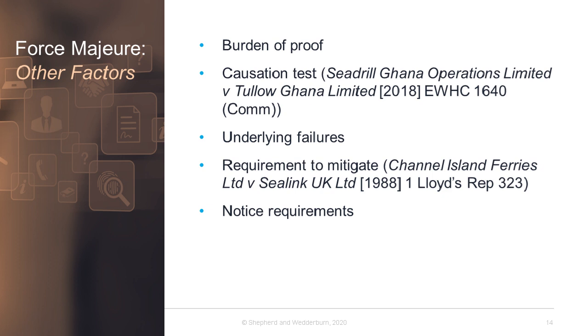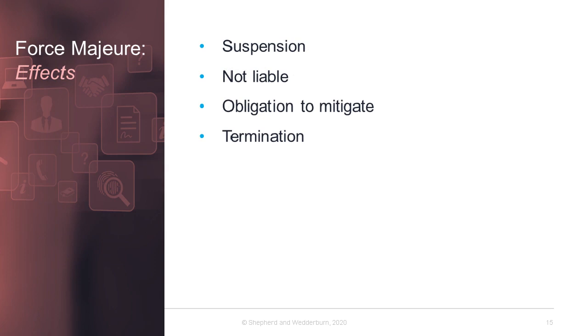It's important to ensure that if you want to rely on the force majeure clause, you comply with any notice requirements, including at what stage the notice needs to be given and whether any updates or other communications are required. Another point to consider is what the effect of triggering the force majeure clause is. Again, this will depend on the drafting of the provision.